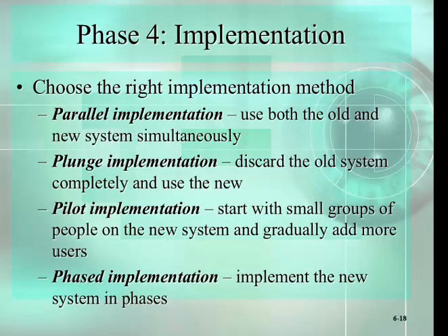The second one is to choose the right implementation method. First, parallel implementation uses both the old and the new system simultaneously. Plunge implementation discards the old system completely and uses the new one. Pilot implementation starts with a small group of people on the new system and gradually adds more users. Phased implementation implements the new system in phases.